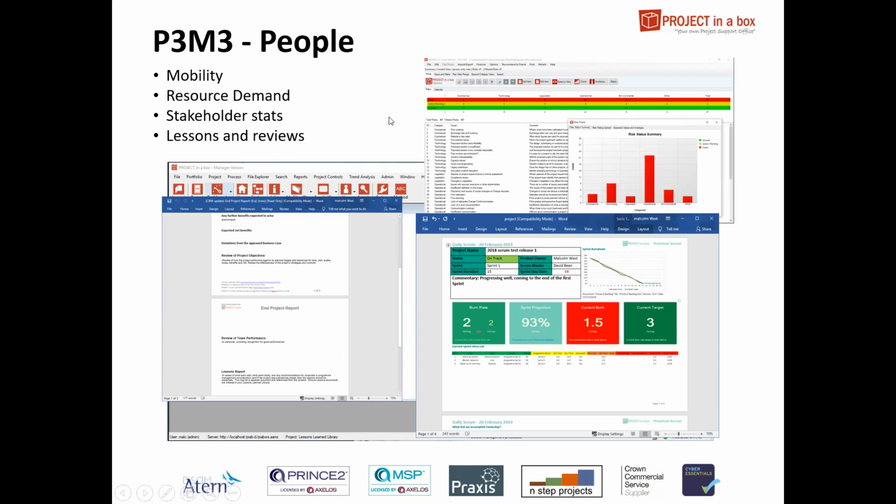A really important thing, though, is about feeding lessons back into new projects. Now, the things I've just talked about, accessing the lessons learned library, require somebody to go and do that. But something that works really well that customers are doing is to take lessons. This is a typical PMO type role or head of projects type role, and they review the lessons on a 6-monthly or annual basis, and they turn those key lessons into potential risks for future projects.